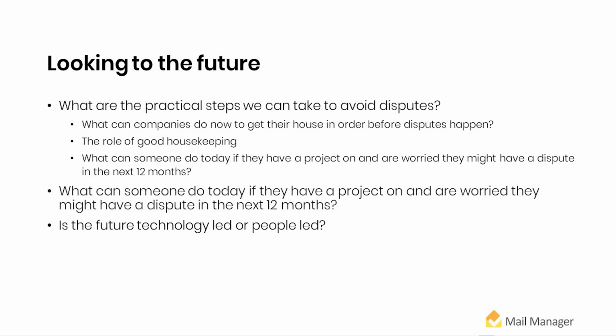And the perfect example of that is a case I had years ago where somebody wrote something on a schedule and that ended up being the linchpin to the dispute. Somebody wrote something on the baseline schedule that was incorporated in the contract. Nobody authorized them to do it, but they wrote it and it was put in the contract, and ultimately the arbitrator focused on that. So you can't be too careful, and I think streamlining those processes, again, businesses just aren't good at that, and that's where improvement will save a lot of money and make a lot of money.